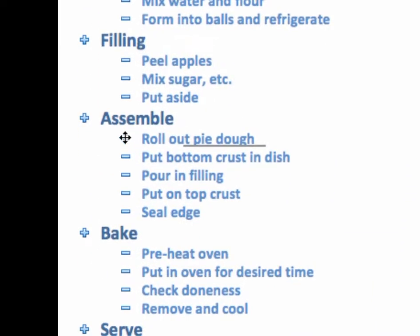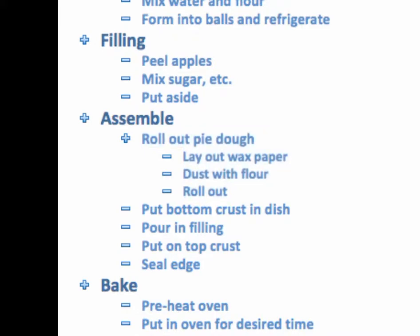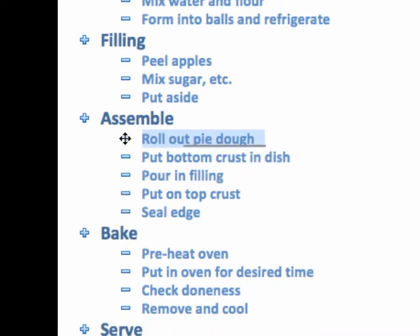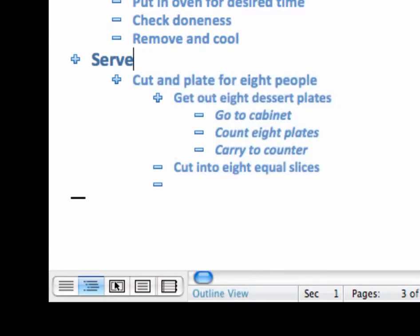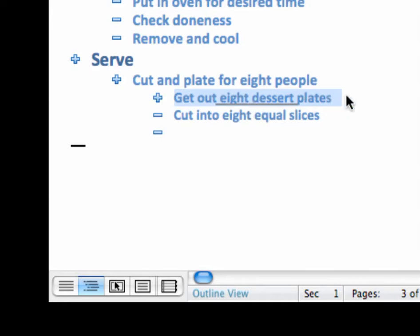Same thing with the filling. For assemble, roll out the pie dough. If you don't have a lot of experience, you might say lay out the wax paper, dust with flour, roll out. This can take a bit of time, so maybe you want to break it out — the roll out really takes about 15 minutes, so maybe just saying roll out pie dough is enough. Moving all the way down to serve: cut and plate for eight people, that's the task. I have to get out the dessert plates — it's not realistic to break it down further into go to cabinet, count eight plates, carry to counter. I'll just leave it at get eight dessert plates. Then I have to cut eight equal slices, put in plates, and I'm done.